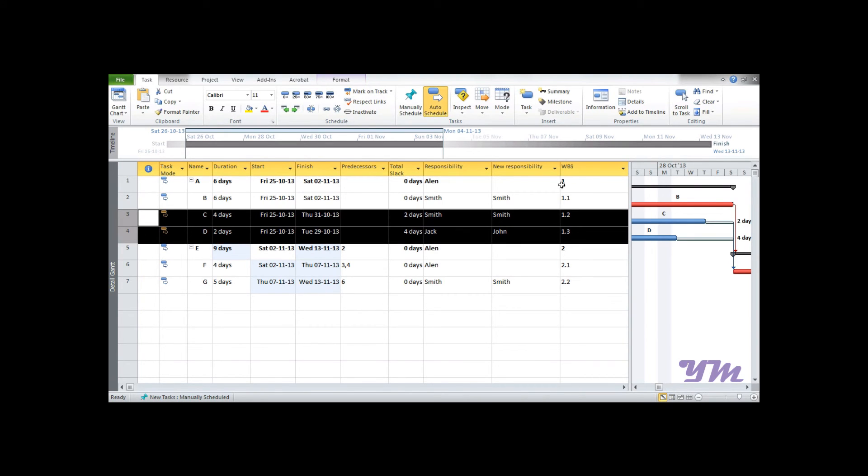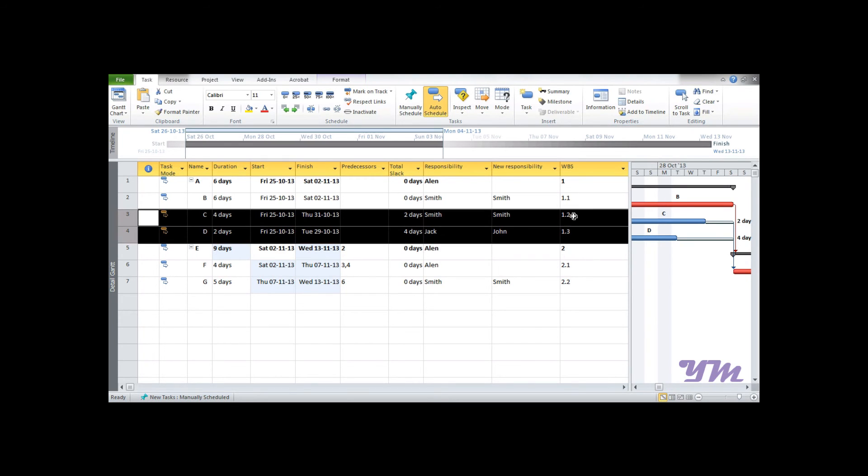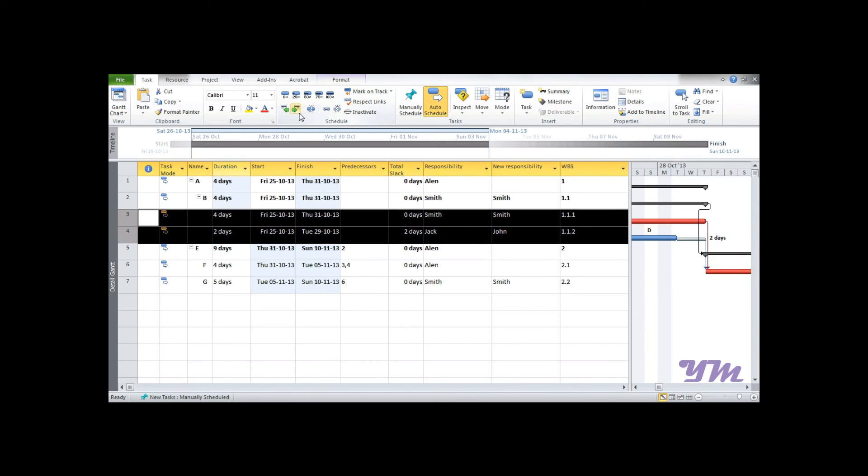So you can see that 1 is A, which is main. 1.1 is B, and E comes out to be 2. So the further sequence goes in this manner: 1.1, 1.2, and 1.3. Now suppose if I want to make C and D part of B, then I would again indent it, right? So the sequence changes from 1.1.1 and 1.1.2.